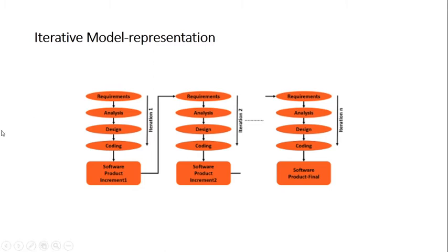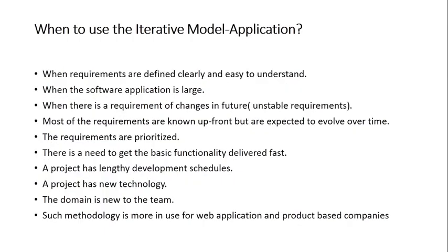So your software will fail if you are using just the waterfall approach, right, or a prototype approach. So if there is any sort of major change, that can be implemented in the next iteration. Further, any changes that come during the development, you can adapt to in the next iteration, right? So there is scope for accommodating these changes in different iterations.